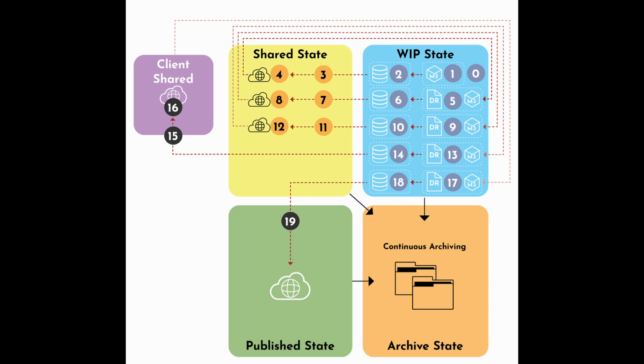At this stage, it is particularly important to focus on quality assurance for the information being produced. Task teams must ensure their files are verified before sharing them with specialists from other disciplines. To support this, it is advisable to prepare a checklist for specialists from each team, outlining specific elements to review before their information is shared.